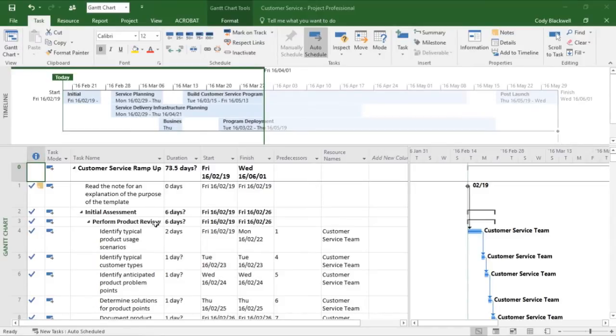Project will assume that the overtime hours are included in the work hours and will not add them as additional hours. This is going to affect the payment to the person assigned to the task as a resource, as Project will not produce the correct amount to be paid to the resource.